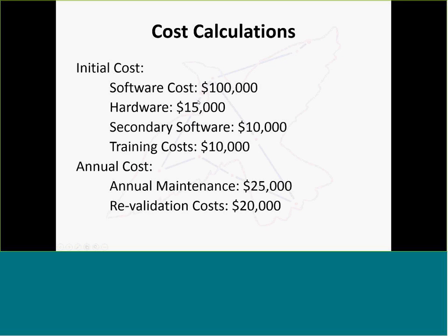So I'm throwing out some numbers, and these have been our experience recently. Software costs, you can expect around $100,000. It may be as much as between $100,000 and $200,000, depending on whether you have to buy a validation package or consulting and all that sort of stuff from the vendor.